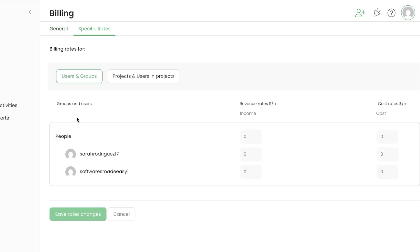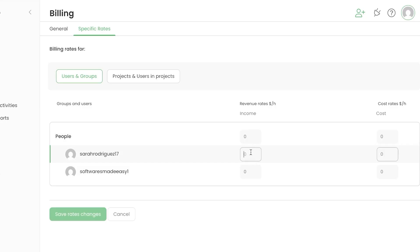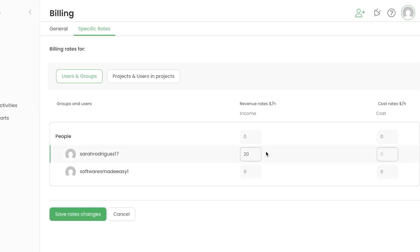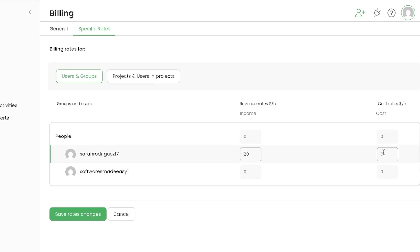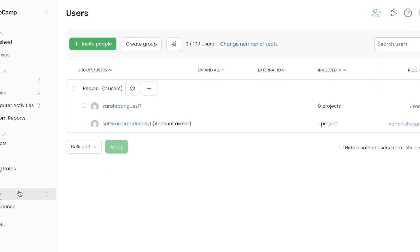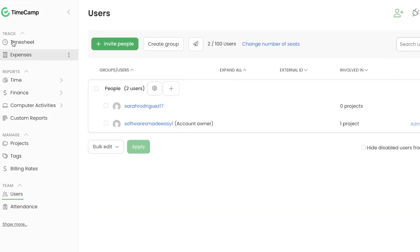You can also create a specific rate for a particular project or person. For example, setting someone's hourly rate — maybe income is $20 and cost is $10. This way you'll know the billing and billable hours worked for each person.